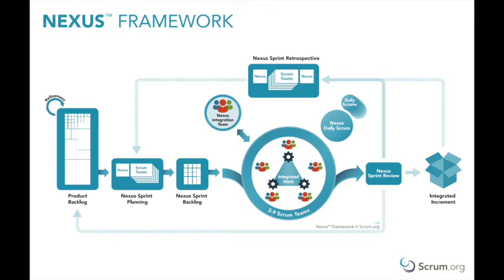First, refine the product backlog. The product backlog needs to be decomposed so that dependencies are identified and removed or minimized. Product backlog items are refined into thinly sliced pieces of functionality, and the team likely to do the work should be identified.